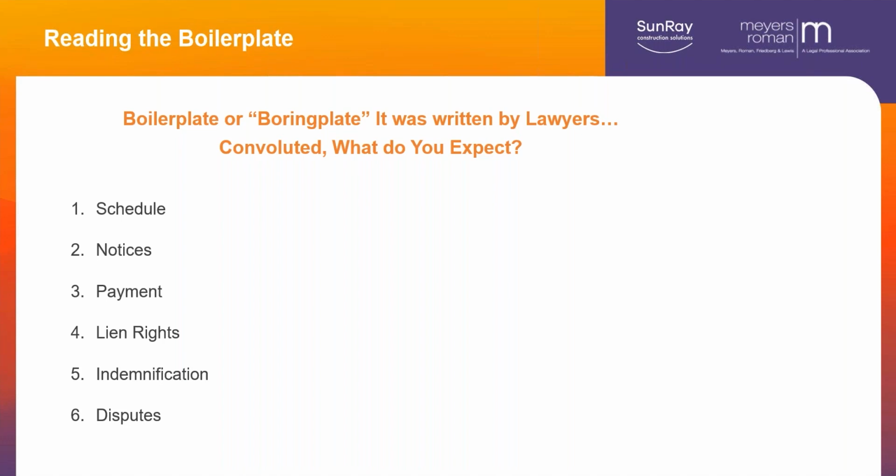Sometimes it can be by email. Sometimes it has to be by certified mail. Sometimes it has to be served within 48 hours. Good luck serving a notice of a subsurface condition or some problem that's going to arise, or a change order, in 48 hours if you've got to do it by certified mail. So you have to be on top of things.